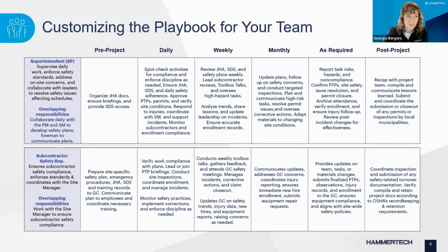That's fantastic. I love those examples, Jake, and I think it's really important to consider it from all sorts of perspectives, whether it's individual roles, externally, or internally, as you mentioned, because the safety program has to move from you as a contractor across onto people as a team. And the scopes of work is an interesting one. I definitely remember being on a project where the crane pad wasn't in someone's scope and we had exactly that and had to process a change order. And I do wonder how the safety plan was developed, if it was rushed. We didn't have an issue with it, but exactly the same issue came up that you just described. So yeah, a very, very real example.